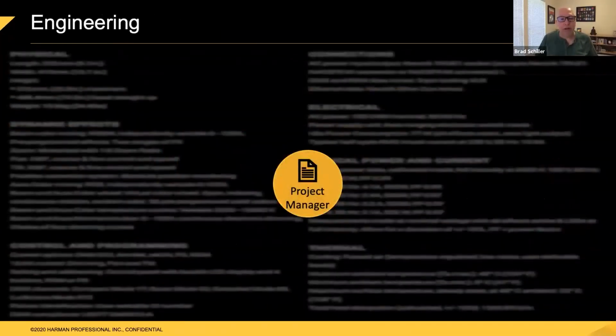At this point, the project's handed over to a project manager. The project manager works within the engineering team themselves and, as the name suggests, manages the project. They will put together a timeline. They will understand all the different engineering elements and know that, well, we've got to design the optics before we can mechanically design the light and know how long of space we need for the lenses. And they'll put timelines and different stage gates of points of where that will all go. And they will come up with a plan based on the full specifications.